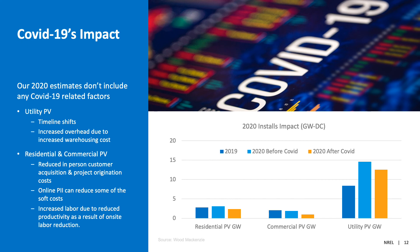Let's look at how COVID-19 has impacted our industry as a whole. When it comes to utility-scale projects, there is not a huge impact like the commercial and residential sectors are facing. While the revised 2020 installation estimates for utility-scale projects have reduced in number, they are still higher than the 2019 installation capacity. Utility-scale projects are mostly in remote areas and in most states, construction activities are considered essential during the pandemic, so projects resumed as usual with only certain projects having to be postponed.